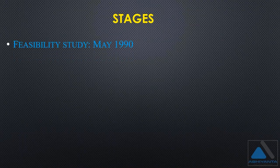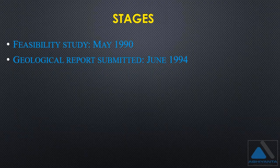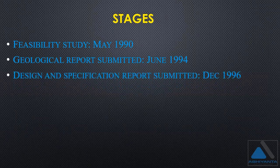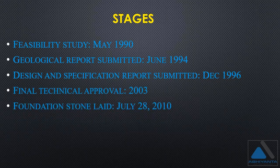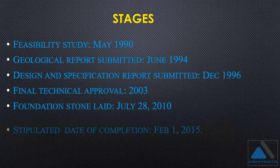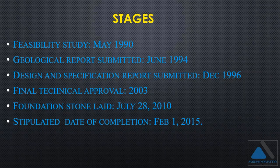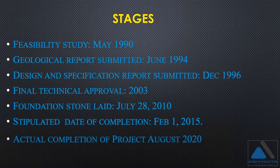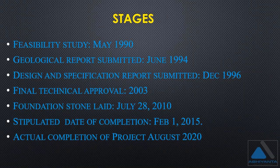These were the stages of the project. The feasibility study was initiated in 1990. The geological report was submitted in 1994. The design and specification report was submitted in 1996. Final technical approval was in 2003. The foundation stone was laid by the Prime Minister in 2010. The stipulated completion date was 2015, but it was actually completed in 2020.